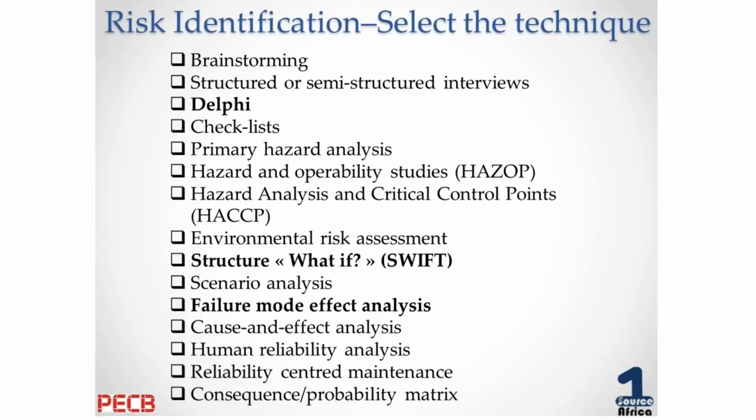I highlighted that in bold because I particularly like the Delphi method. It's where you develop check sheets or opinions from experts. The opinions are shared, not necessarily mentioning which experts said what, and you end up with an opinion after a couple of reiterations. Now, there is a bit of a problem with the Delphi method. It's a bit of a time-consuming process. However, you're going to have a much better result than just doing an interview or a workshop scenario.